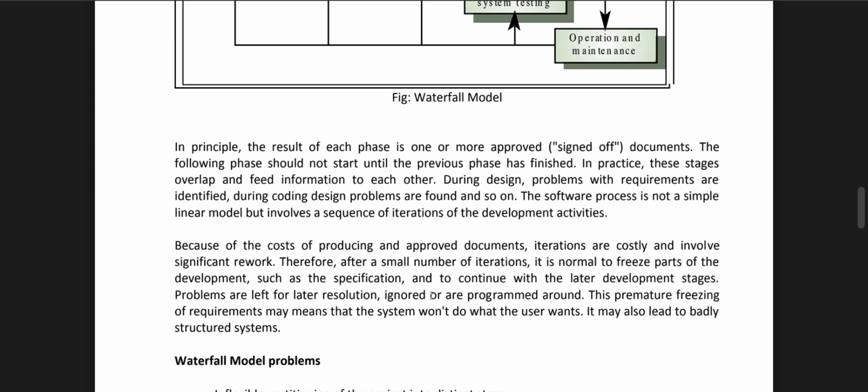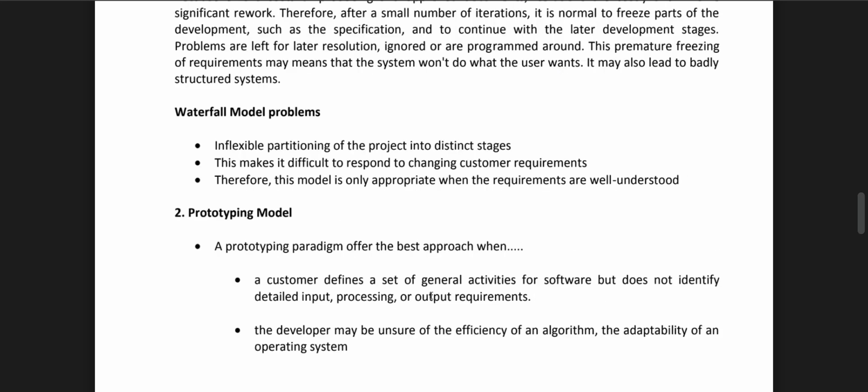The premature freezing of requirements may mean the system won't do what the user wants. It may also lead to a badly structured system. The waterfall model's inflexible partitioning of the project into distinct stages makes it difficult to respond to changing customer requirements. Therefore, this model is only appropriate when the requirements are well understood.